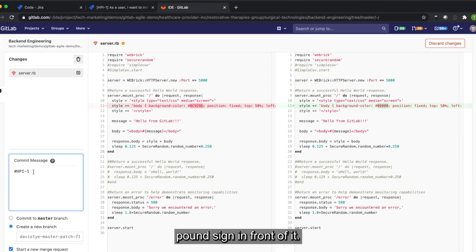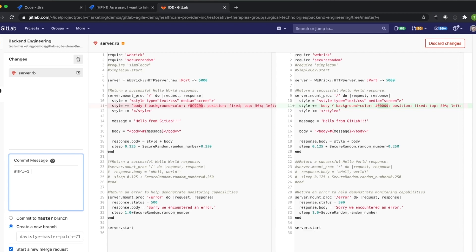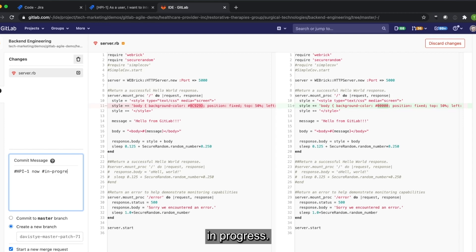And in that commit message, I can also use the ability to make a transition. So I began working on this, so I'll put now in progress.